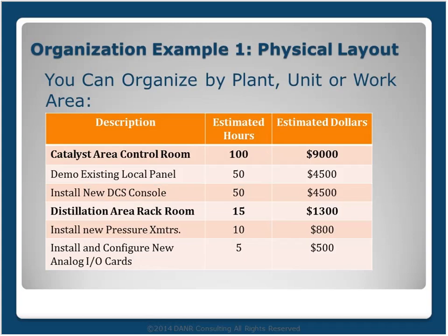So when you set up an estimate, a scope document, or a schedule as part of an FEL, there are many options for how you can organize it. And it's important to give thought to this and to set them up in a way that matches how you're going to manage the project. This will allow you to actually transition from the FEL phase to the project execution phase fairly seamlessly.